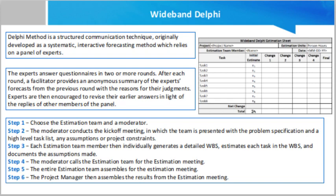Step 6.1 — the project manager compiles the individual task lists and their corresponding estimates into a single master task list. Step 6.2 — he also combines the individual lists of assumptions. Step 6.3 — he then reviews the final task list with the estimation team.